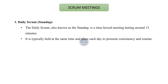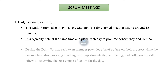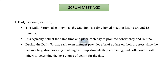It is typically held at the same time and place each day to promote consistency and routine. During the daily Scrum, each team member provides a brief update on their progress since the last meeting, discusses any challenges or impediments they are facing, and collaborates with others to determine the best course of action for the day.